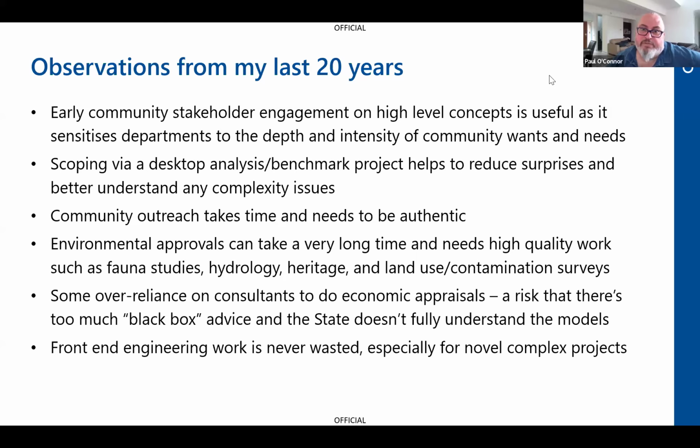inspired. It's very expensive. I mean, for a $12.8 billion project, you spend 90 million on an engineering firm who's going to provide you all those services. It does feel like a lot of money, but on the other hand, they potentially might have saved them a lot of money too, through avoiding mistakes.